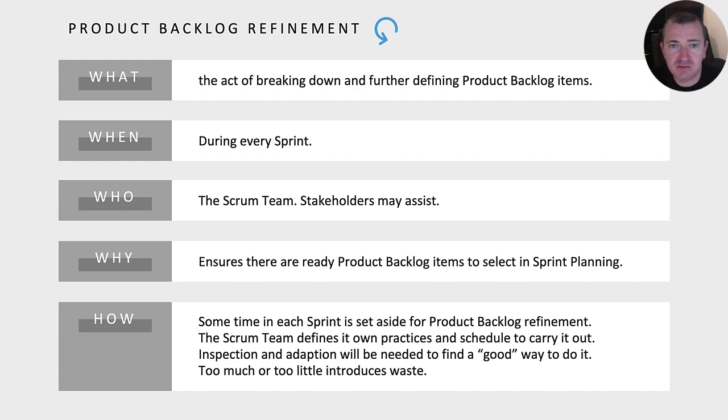If product backlog items are sized as part of refinement, then this will be the responsibility of the developers. The product owner may influence the developers by helping them understand and select trade-offs. Refining product backlog items to the right level at the right time is important. In a complex environment, it's difficult to predict what will be needed or how needs may change in the future as more becomes known about the product.